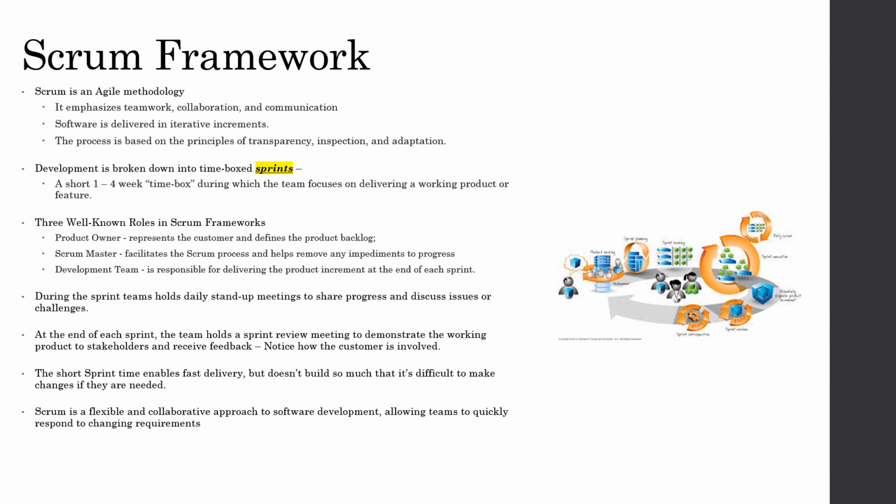So what we get with these short sprints and this Scrum framework is fast delivery of small bite-sized chunks of pieces of our final project. And when we do it that way, we don't have a year invested in the effort and find out, oh, we got to go back to month 6 and make some fundamental changes and then redo a bunch.